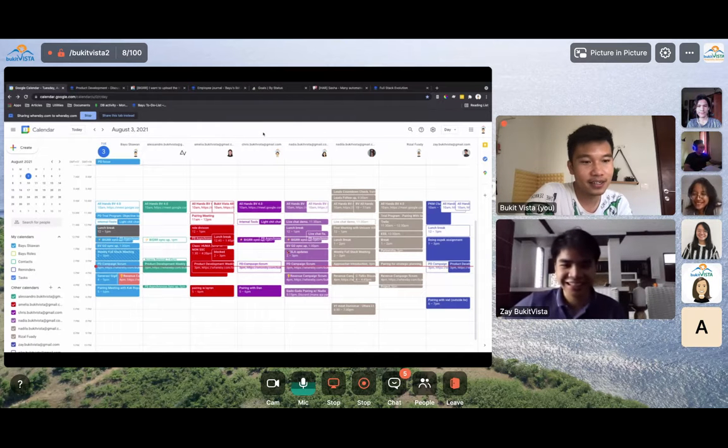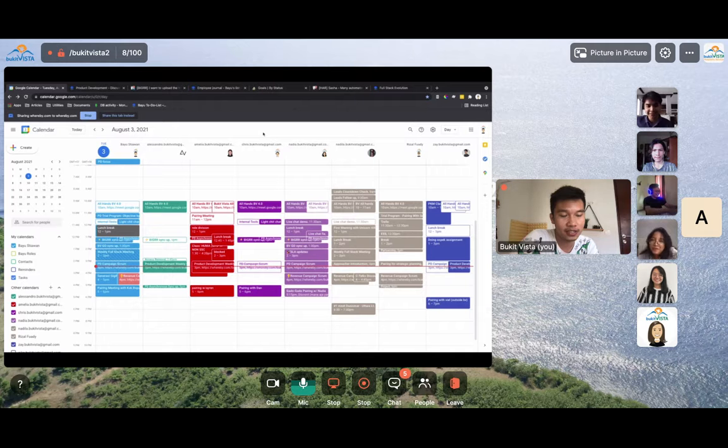Okay, so as a host, basically, it's pretty simple, Stefan. You ask the question to each person, right? Like, Nadia, what are your three activities today? What is your pending list? What are you going to work on today? And then what's your friction? So basically, that's your job. But the important thing is you need to make sure that this event is actually happening.